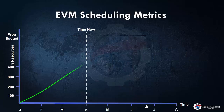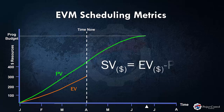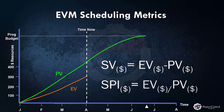Let me show you what I mean. This is an example of a project which is obviously behind schedule because we are earning less than what we planned to earn. Schedule variance is the difference between earned value and plan value. Because earned value is in currency and plan value is in currency, the schedule variance — the amount of variance from your plan — is also in terms of dollars and not units of time. You cannot really use cost or dollars to speak about time units or the amount of delays in terms of duration.